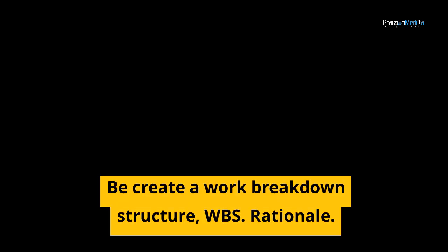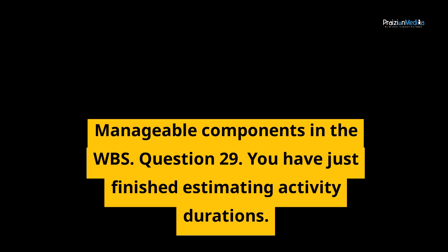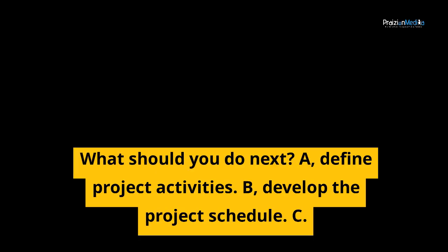Correct answer, B. Create a work breakdown structure, WBS. Rationale. Once the project scope is defined, the next step is to break down the project deliverables into smaller, manageable components in the WBS. Question 29. You have just finished estimating activity durations. What should you do next?